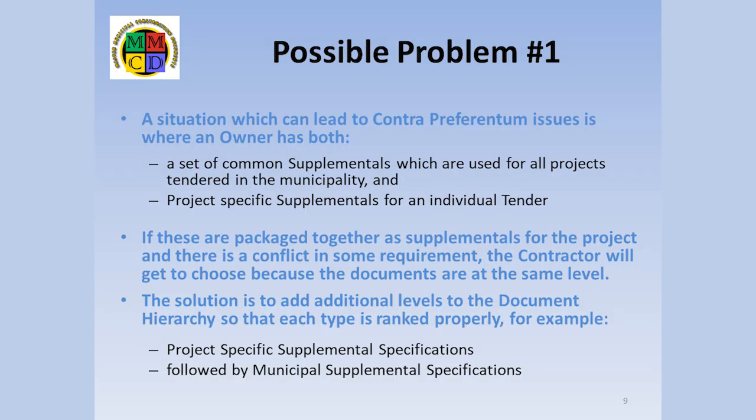I'd like to discuss two situations I've seen which lead to document hierarchy problems. Frequently, an owner will have a set of common supplementaries which it uses on all projects that it builds. In addition, there will be project-specific supplementaries. Often, these are combined as one group of supplementaries when tendering. If there is a conflict between documents in these supplementaries, then there's no way for the document hierarchy to help, as both are at the same level. Common sense would indicate that anything project-specific should override items used for all projects, but that's not what the documents say.